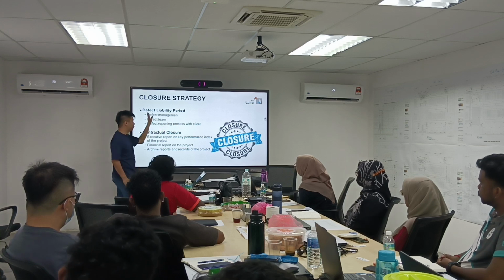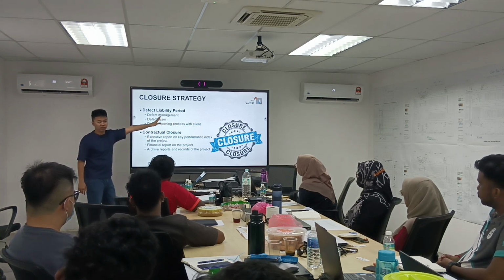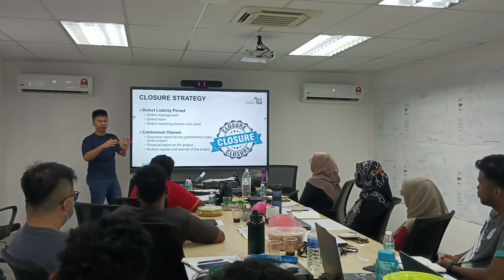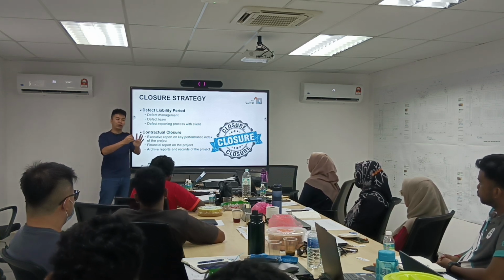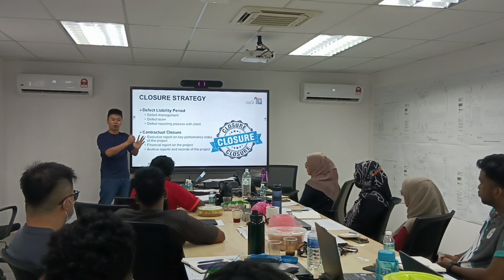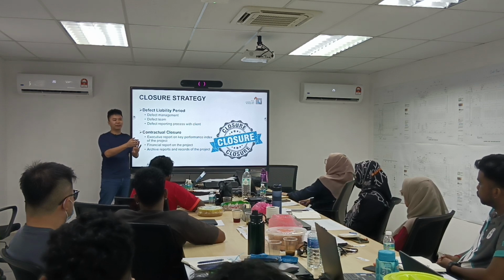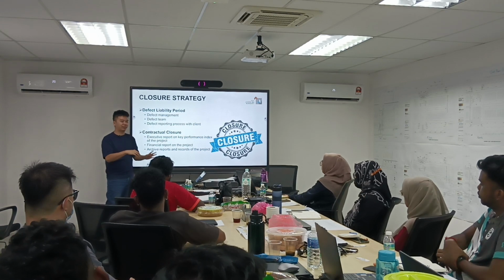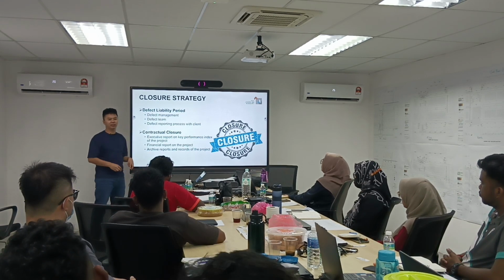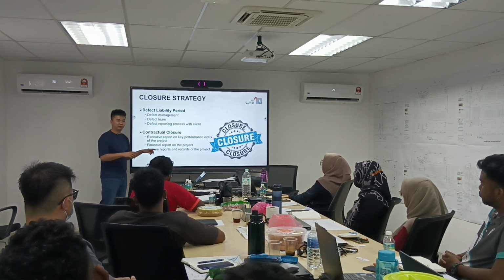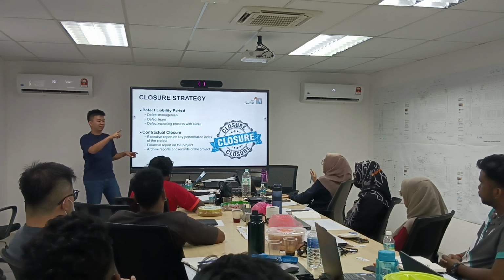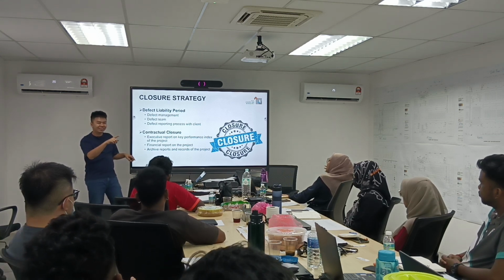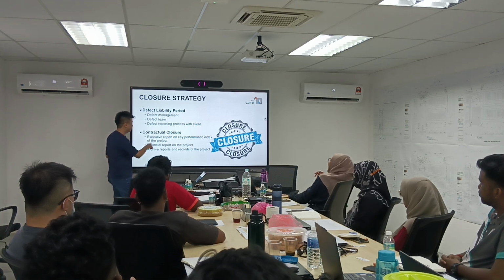But outside the strategy, you guys know what is a DRP, right? So basically, it's a period defined in the contract. It's either 12 months, 24 months, or 36 months that you warranty the building. So if the system go wrong, installation got problem, everything you need to fix up. Okay? So end of the DRP period, we issue a document called CMGD. Okay? So what is CMGD? Yeah, CMGD. Correct, you are right.